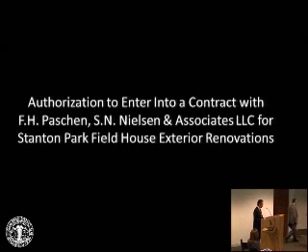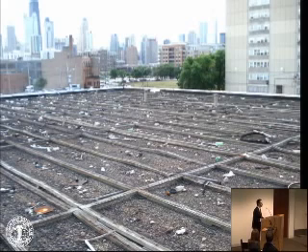Construction to be substantially completed by July 9th, 2012, with a contract amount not to exceed $1,198,000. This relates somewhat to the last item, and this is a fully TIF-funded project. The minority and women-owned participation for the contract include 25% minority-owned, 5% women-owned. Where is this park located? On Division and Scott. Larrabee, 27th Ward.